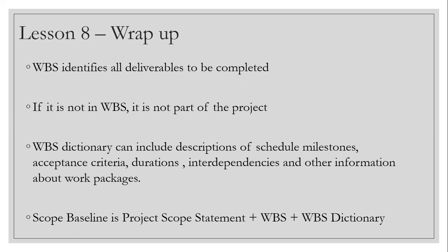In fact, in many of the workshops I have seen, the project manager does the WBS and the scope statement together in one shot. And the dictionary is just a part of like three to four hours where people can document stuff. But the point is, they give a lot of importance to the WBS. From the project charter, what you got by talking with the stakeholders, you wrote the project scope statement, right? But to have the entire work packages in front of you, you definitely need to do brainstorming. You need to have your entire project team here and look at some historical records of the company. If there is a templatized kind of WBS there, that will really help you to get a nice, deeply driven kind of WBS.